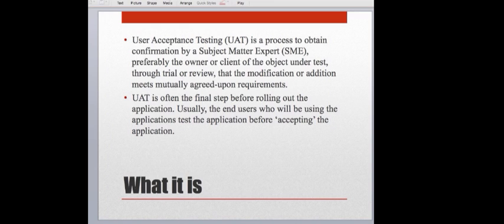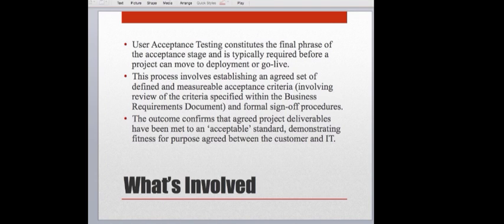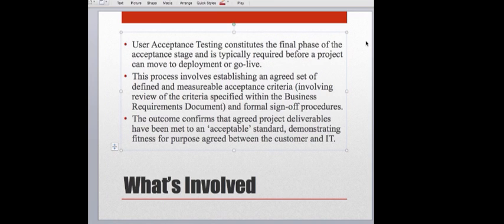User acceptance testing really constitutes the final phase of the acceptance stage and is typically required before a project can either move to deployment or go live. Sometimes it's more of a pilot that's happening rather than an actual across-the-board go live, but it really doesn't matter. User acceptance testing is the last thing that's done prior to the decision to go ahead and move forward with it going live.